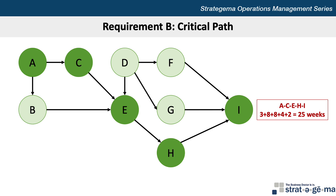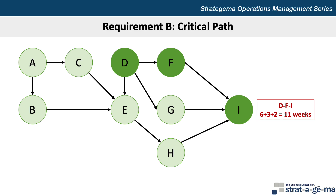Our second path is A-C-E-H-I with task times of 3, 8, 8, 4, and 2 weeks respectively, summing up to a total path time of 25 weeks. A third path through the network is D-E-H-I with task times of 6, 8, 4, and 2 weeks respectively, for a total of 20 weeks. A fourth path is D-F-I with times of 6, 3, and 2 weeks for a total of 11 weeks. And the last path through the network is D-G-I with times of 6, 5, and 2 weeks for a total of 13 weeks.